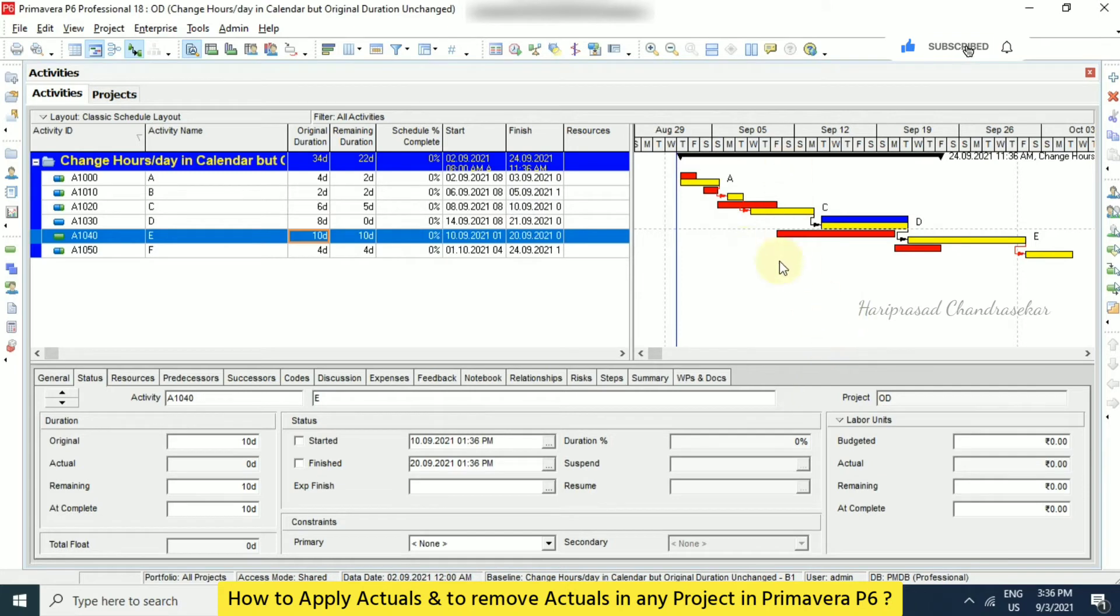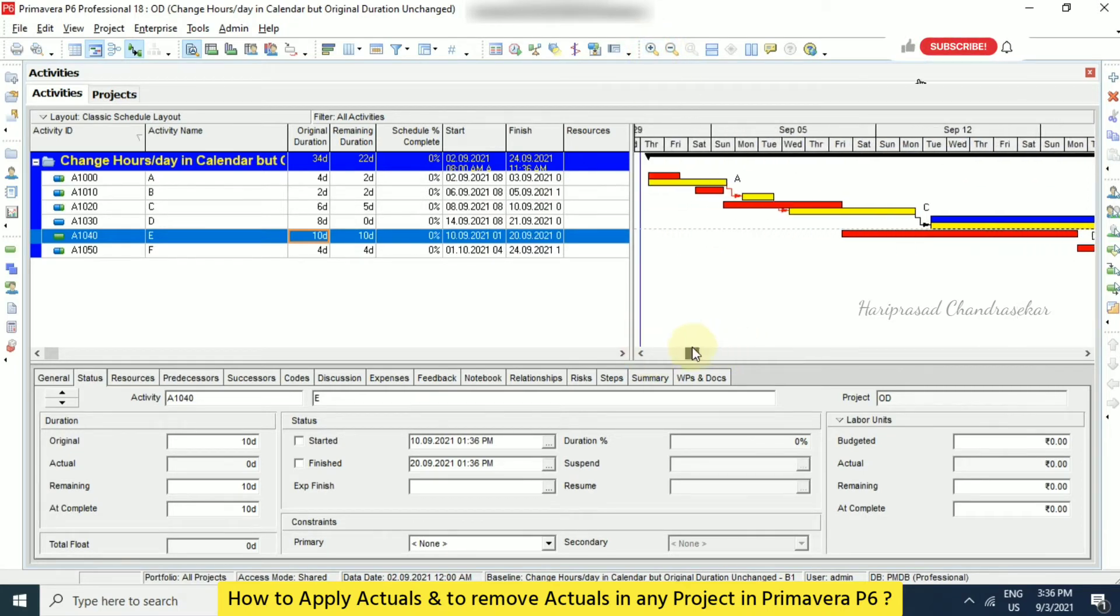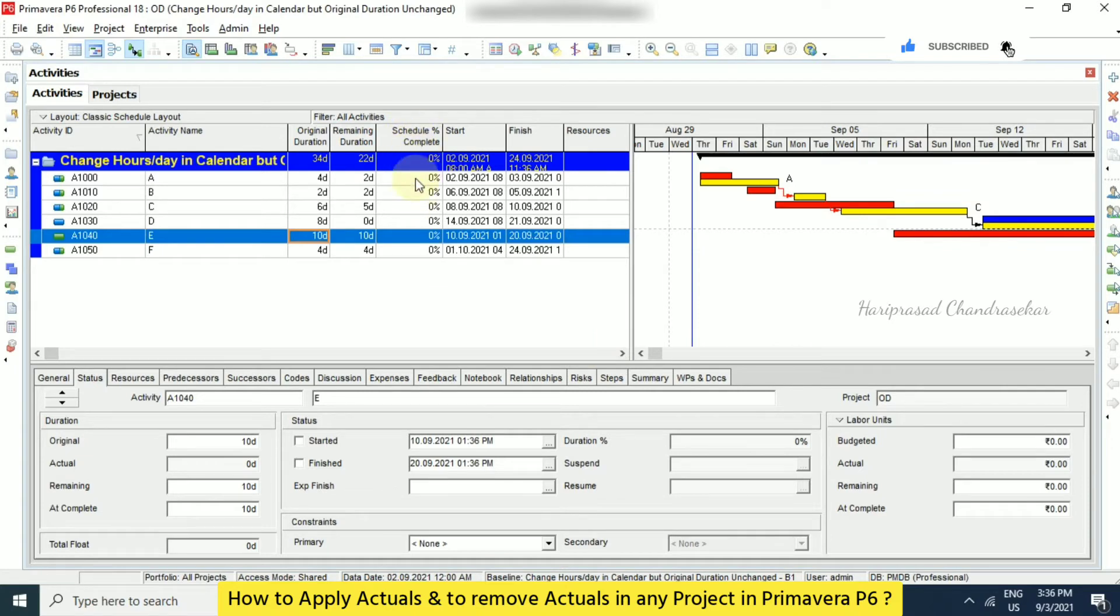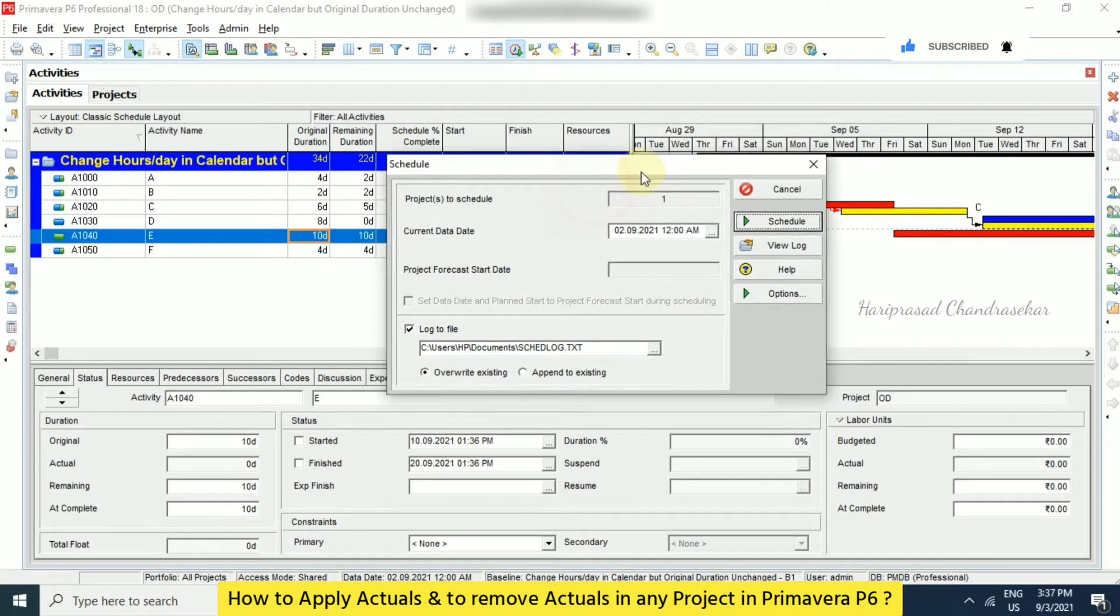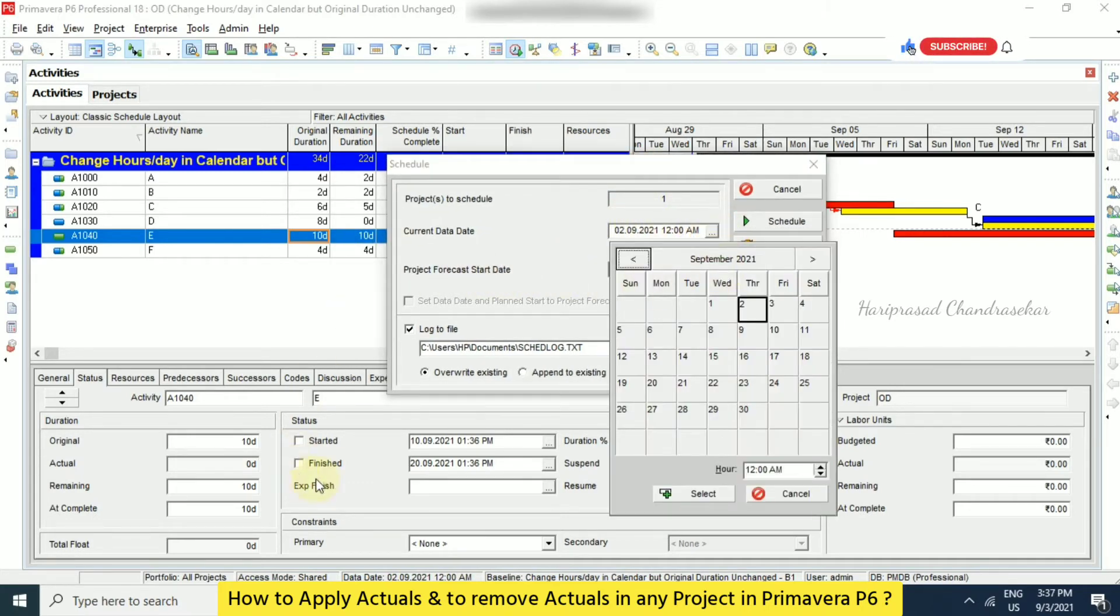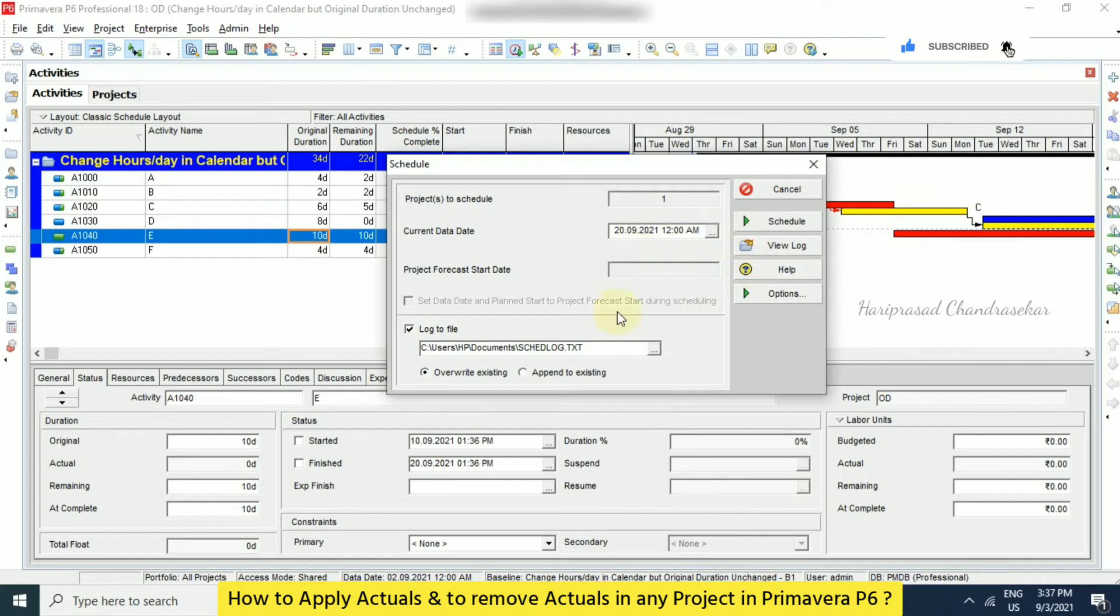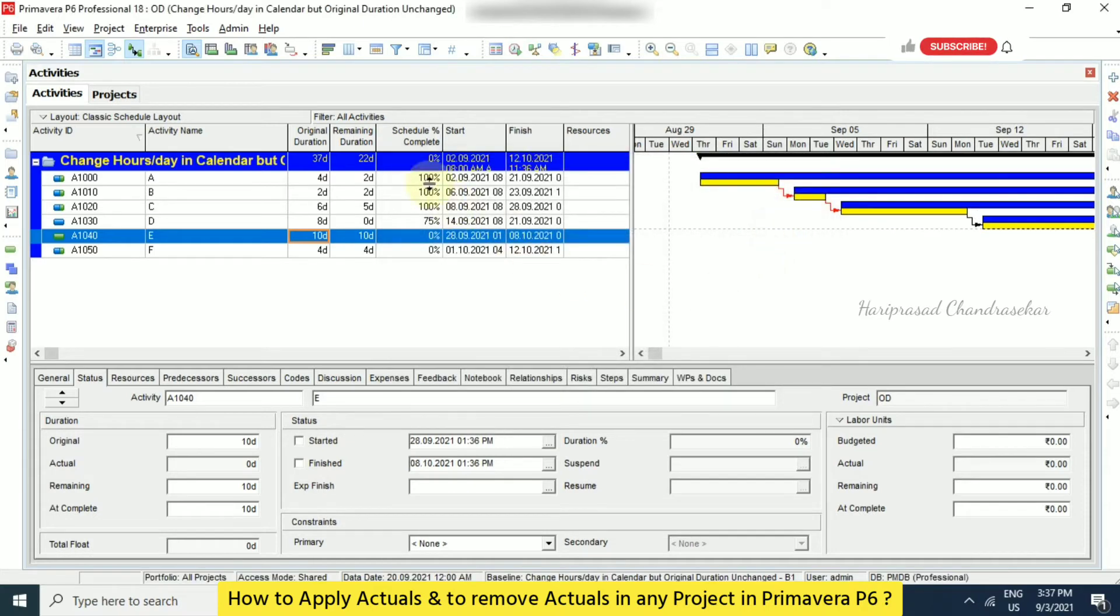So now we can see the progress. Now based on our inputs, this is our progress. So immediately we can see remaining duration and everything. But the schedule percentage complete is not updated. Why? Because we have done one mistake. Here current data date, we need to choose something apart from the actual date, which means we have this update on the 28th. For example, if I am telling 28th or 20, select that. On the day we have this kind of updates, applying that actuals. So we need to choose the date and we can schedule. Now we can see the schedule percentage complete.